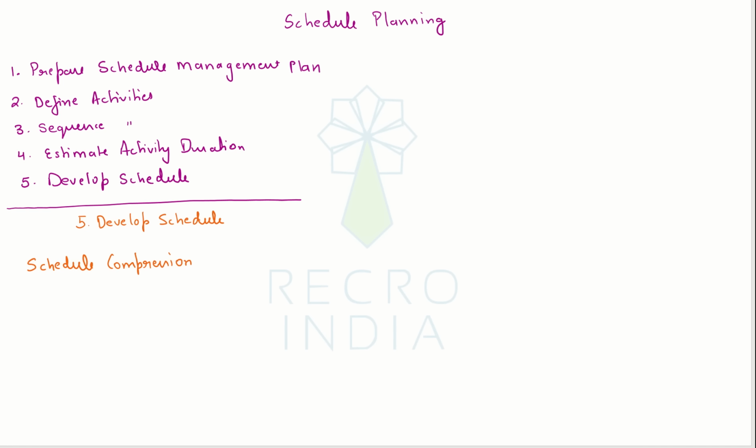See, you might have to compress the schedule at any point of time during the project. Right now, in the planning, maybe the stakeholders are not happy with the time you are predicting for the project and hence they want you to compress it. Or maybe during execution, there are some delays that have crept in, and because of that, you need to compress the remaining schedule. So it can be used anywhere.